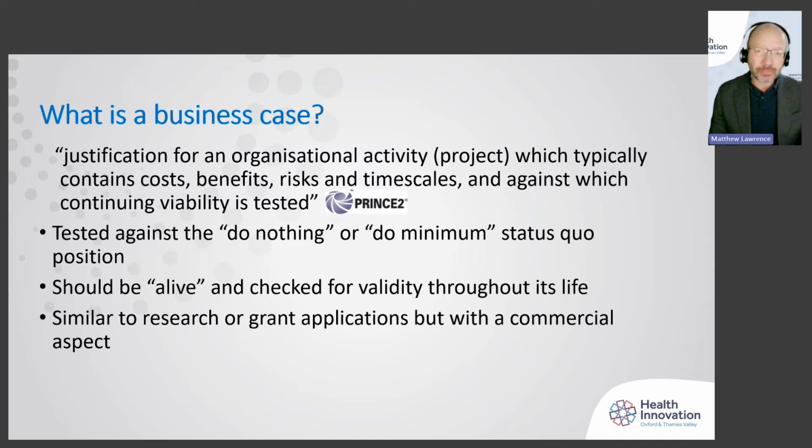When I say alive, it means you don't just approve a business case and that's it, you keep going. If something changes in the economics or the outcomes, you might have to then check it back again against the original business case, revise it and make some changes as you go.